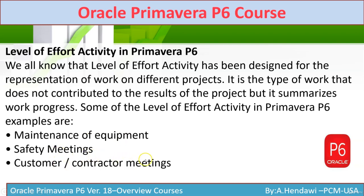Activities like equipment maintenance, safety meetings, customer management, and procurement commonly use Level of Effort to represent them. For example, if you have a procurement activity spanning nine months and don't have details, you add a procurement activity in P6 and use Level of Effort to represent that work. You can tie it start-to-start and finish-to-finish with its predecessor and successor.